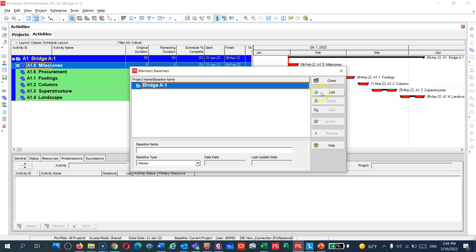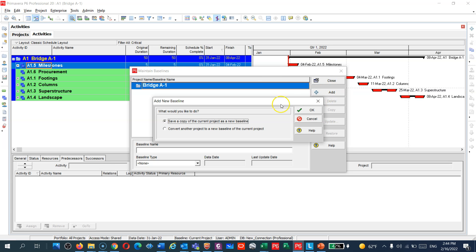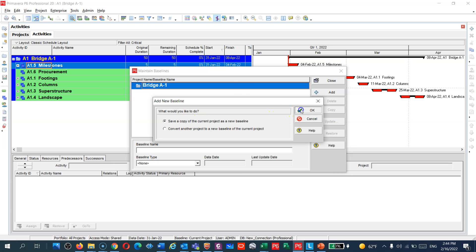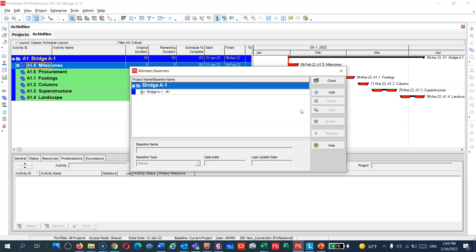Add, and you will have two options here: save a copy of this project as a new baseline, or if you have another project or another schedule you can convert it here. What I'm gonna do is I'm just gonna make a copy from this schedule as a baseline.